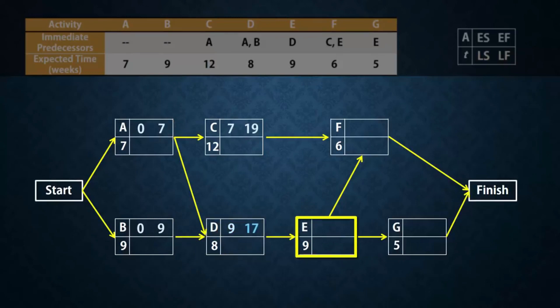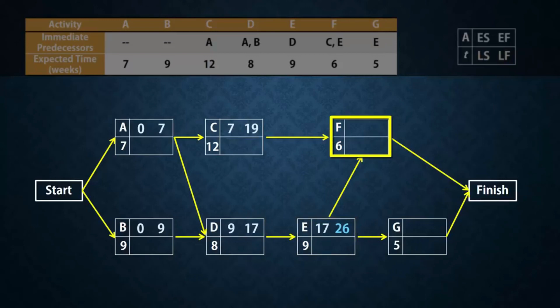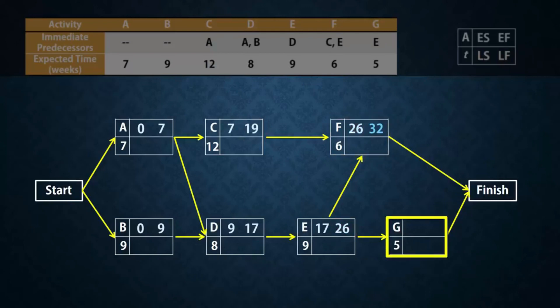E has only one predecessor D, and so can start at 17, and finish earliest at 26. F has predecessors C and E. Since the higher earliest finish time is 26, F can start earliest at 26, and finish at 32. G also can start earliest at 26, since it has only one predecessor E, and G can finish earliest at 26 plus 5, which gives 31.